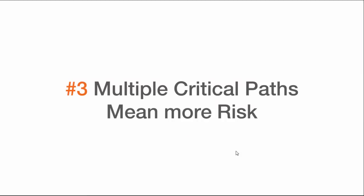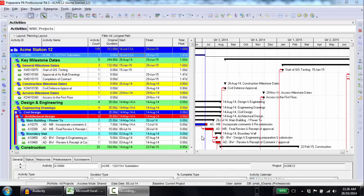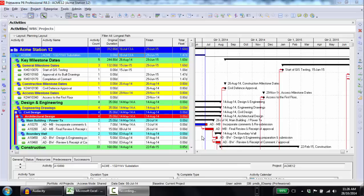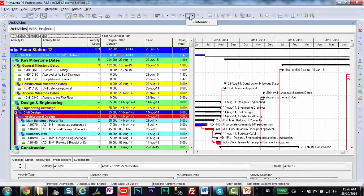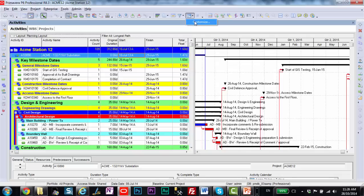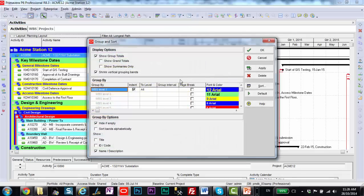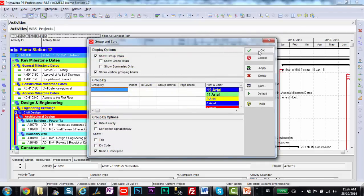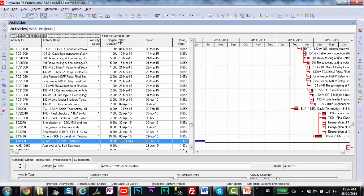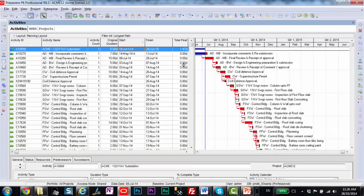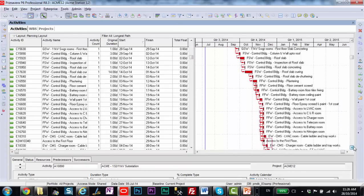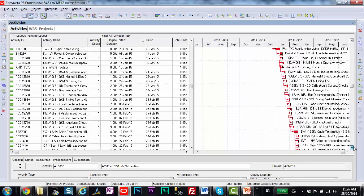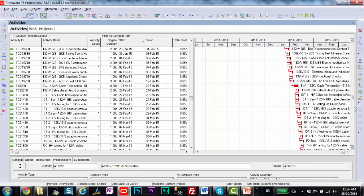The third thing I wish I'd known earlier in my career was that multiple critical paths mean more risk to the project. What do I mean by that? Let's have a look at P6. So I'm back in Primavera P6, and I want to look at my critical path in such a way as I want to see if I have overlapping critical path activities. How do we do that? Well, I still have my longest path filter on. And what I can do is simply go up here to the Customize area. I can open that and simply just hit Delete to remove any grouping. And then I'll simply sort this whole thing by start date. And what this gives me is a very clear and very structured critical path picture.